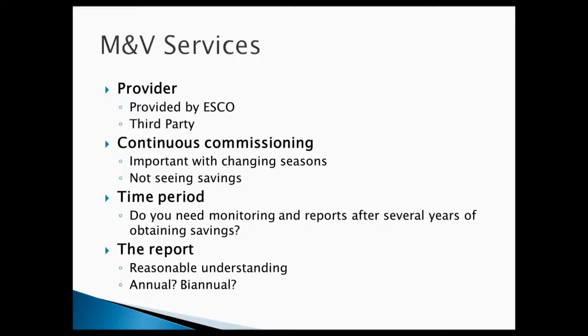Now, speaking about the specific M&V options, one thing we've not made clear is that M&V isn't a one-size-fits-all sort of thing. It can and should be specific to each ECM. And because it will impact the ultimate cost of the projects, it needs to be something that's selected during the IGA and finalized as part of the contract.